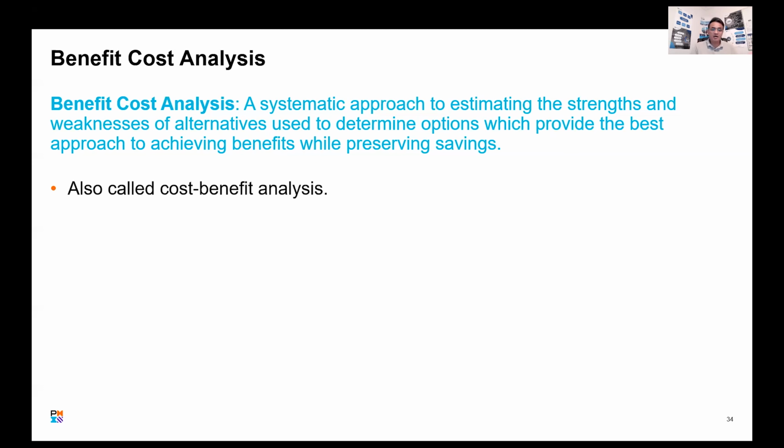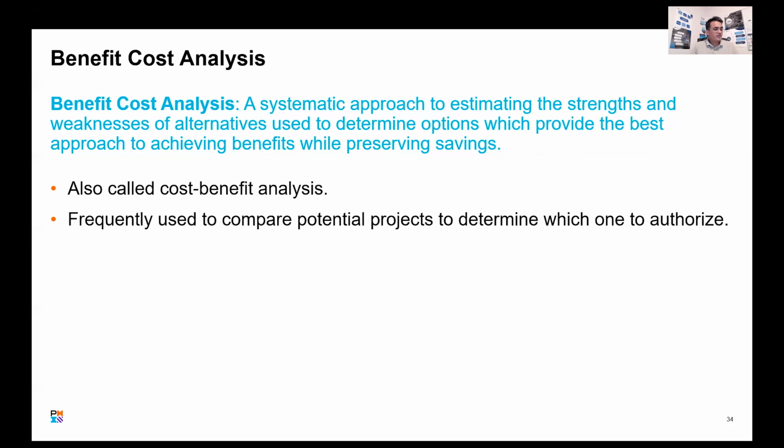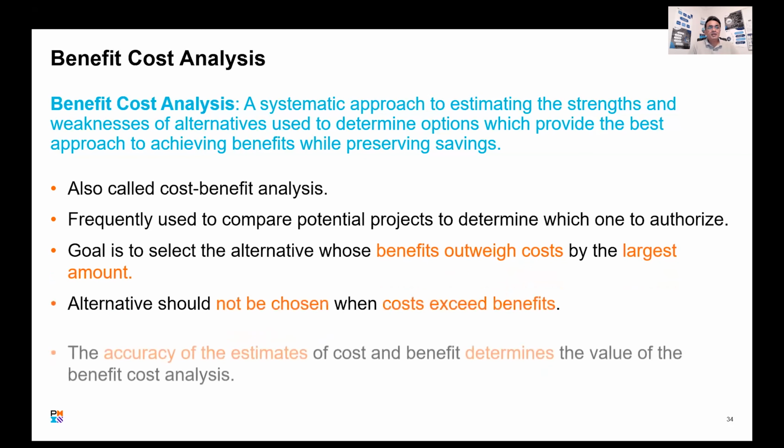So when we buy a car or buy a house, we look at not only our benefit of living in the house, but we're also looking at its value appreciating over a period of time. Cost benefit analysis is one of the key tools that we use to measure the options to do a project, or also compare potential projects. So when we are prioritizing projects, we can do a cost benefit analysis for each project to come up with an answer whether it is worth doing project A, or which one will give us more benefit for the minimum cost. That's why we do it, right? Okay.